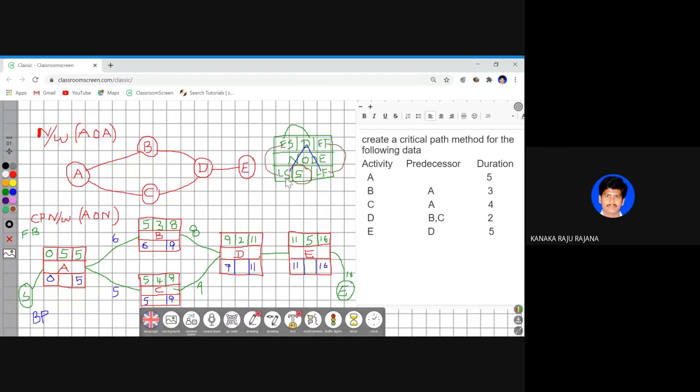Late start, early start, late finish, early finish. While taking the difference, please remember that you are not supposed to get a negative value. If you achieve a negative value, your project has gone wrong somewhere, which means it is a wrong project. Please remember this point. Slack should always be positive.